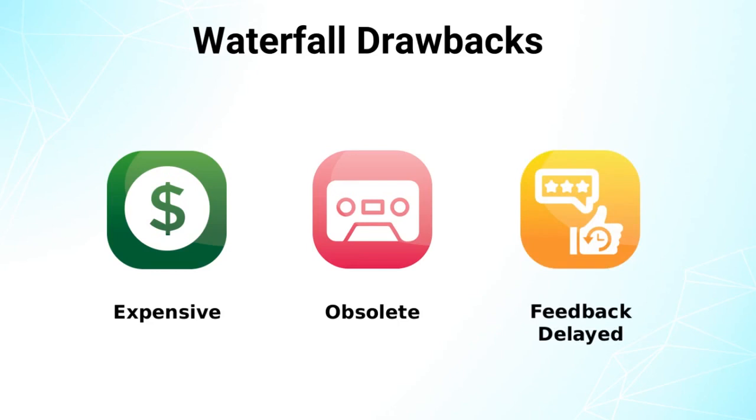For example, let's say that you identified a high-value feature during the analyze phase. That feature eventually is released when the product is released. This can be months or years after the high-value feature was identified. This is a long time to wait to learn that your high-valued feature is actually of low value. Delayed feedback like this is a source of waste in the project.